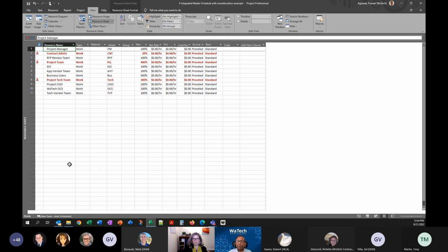So the other benefit of doing it at a team level is you can do it based on the capacity of the team. So in here, as an example, I have a project team available at 400%, which means equivalent of 4 FTEs. Behind the scene, I, as a project schedule person, may not have to be worried about is it 8 FTEs at 50% availability or 4 at full time, or if 7 are same, one has changed.